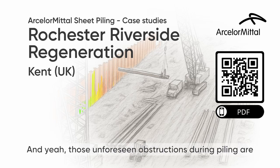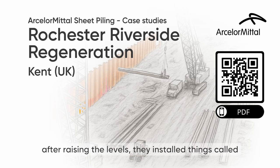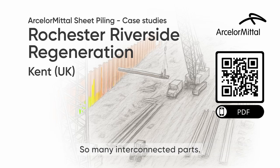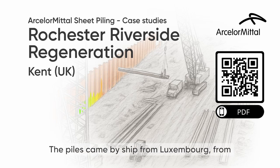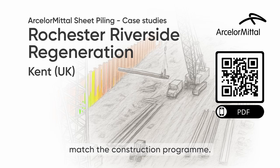Wow, quite the process. And yeah, those unforeseen obstructions during piling are always a possibility. Plus, to help the new ground settle properly after raising the levels, they installed things called vertical band drains. Okay, what do they do? They basically help squeeze the water out of the soil faster, accelerating the ground settlement so they could build sooner. So many interconnected parts. Even just getting the steel there must have been a job in itself. Huge logistical exercise. The piles came by ship from Luxembourg, from the inland port at Mertert, all the way to Rochester. Just in time. Yeah, phased deliveries over nearly 6 months to match the construction program.